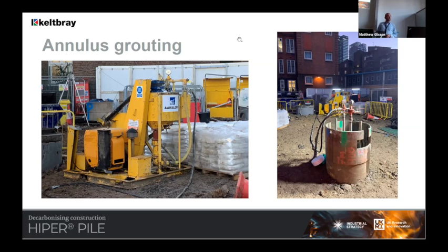So we've now secured our second, third, fourth, fifth, and sixth projects with HS2. To give you an example, the cost of the installation of those 40 piles was around about £700,000, so quite expensive. It is a highly innovative project. It will be monitored for the next 10 years, but the energy cost saving that we'll have over those 10 years is £700,000. We're going to heat and cool the building for 10 years just from the piles alone.